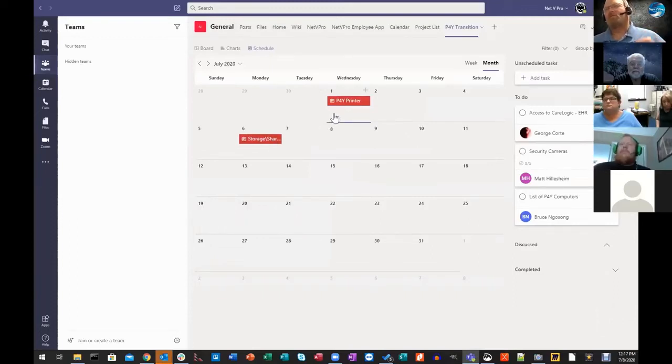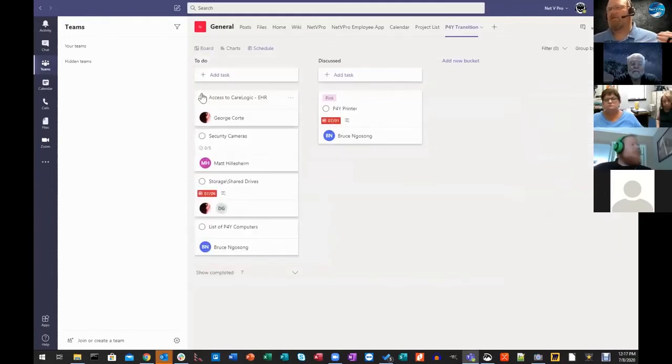If you have a project that has a lot of deliverables over the course of a month, let's say, for example, you can see which days have which deliverables. And that can allow you to see, oh, geez, I have some time conflicts here. It gives you a real easy, consolidated way to understand what you're doing, who's assigned to it. Because if I look at it and I see I have John assigned to 20 tasks on one day, that might be a problem. So it allows us to manage those things just a little bit better.